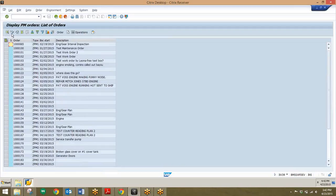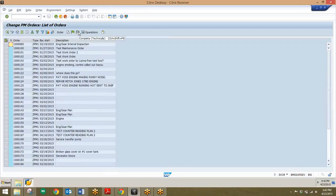In addition, we can click on this change button here, which will switch back and forth between change mode and display mode. When we click this, we can see that these two buttons come up, which will allow us to either release an order or choose to technically complete an order. That's done just by clicking on one of these gray buttons here, which highlights the line, and then clicking on either one of those two buttons.